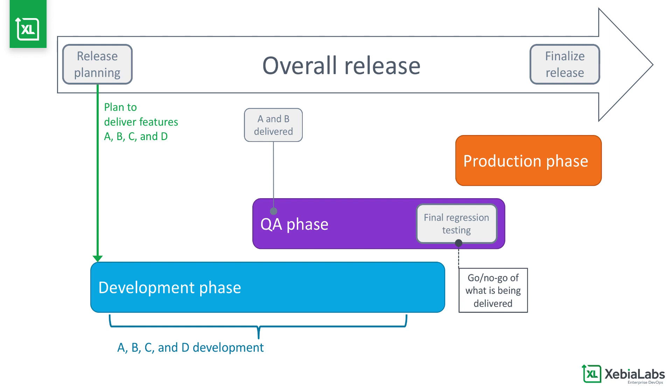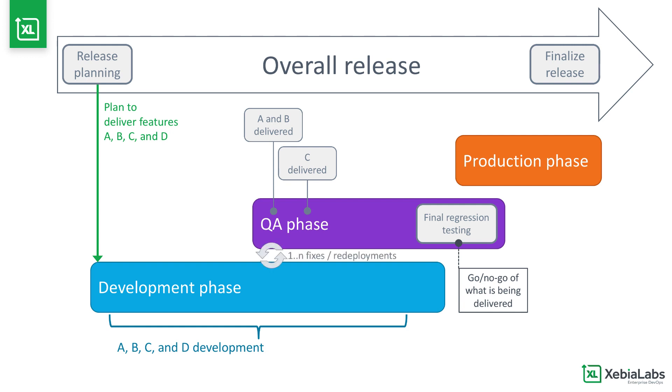The QA team starts to test these features as they're delivered, but then two things happen. One is that the development team continues to deliver other features, which pile up in QA's queue waiting for testing. The other is that QA starts finding bugs in the features that have already been delivered, which kicks off an iterative cycle of code changes and retesting.